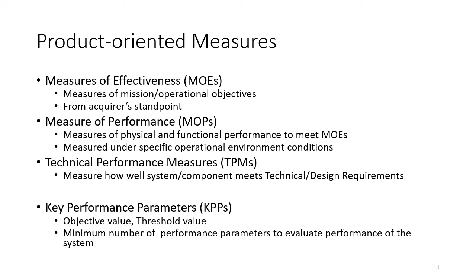Switching from process to product-oriented measures, there are three tiers. The first is the operational mission level, measured in terms of measures of effectiveness (MOEs) — you put the product in the field and measure how well it meets the operational mission requirements. The second tier is measures of performance (MOPs): lab-type measurements where, under specific operational and environmental conditions, you measure the physical and functional performance of the system against its requirements.